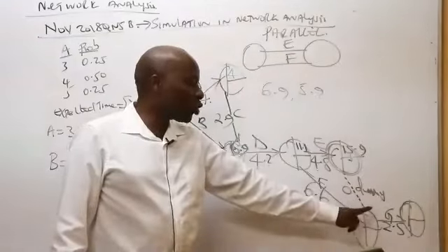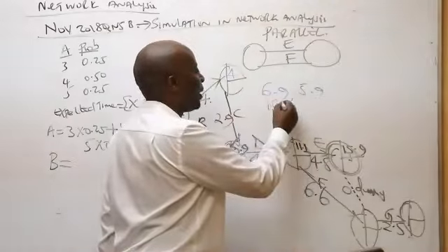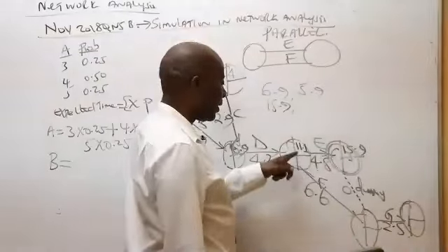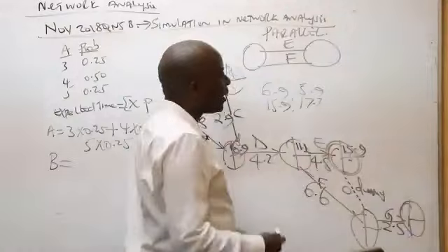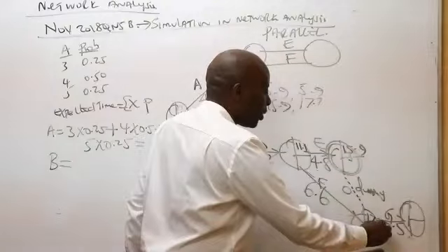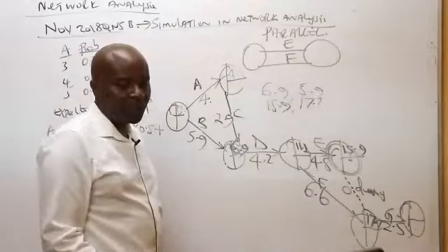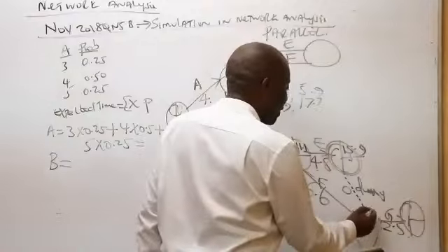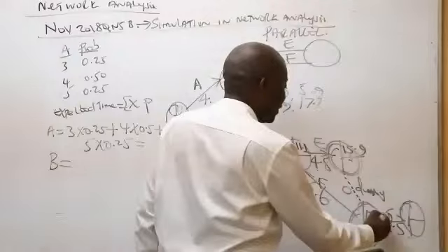But when I come to this, there is a comparison to be done. There is a dummy arrow getting into this. The dummy arrow will give me 15.9. And then now there is the F arrow. F arrow will be giving me 17 point what here, somebody? 17.7. So between the two, which one should prevail? The higher. So the higher is the one that I'll put here. 17.7 is what I'll put there.